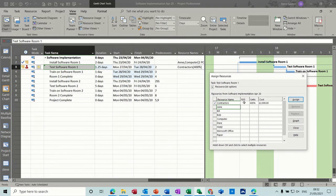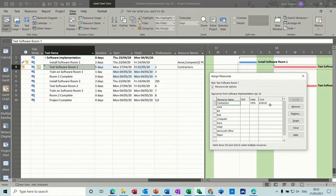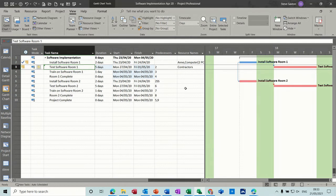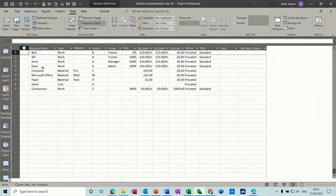If I put the contractors to four, they get over-allocated, so I'll put that back down to three. Normally you just have contractors on a fixed contract and assign them — that's the cost. If they bring 10 men or one man, that's their choice; you don't normally pay extra for extra contractors. So that's how you assign resources and create resources — the main area is the resource sheet.